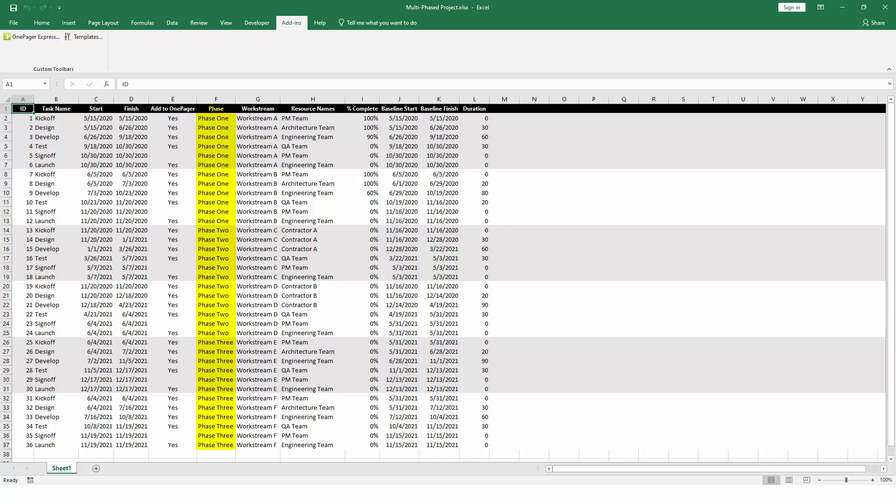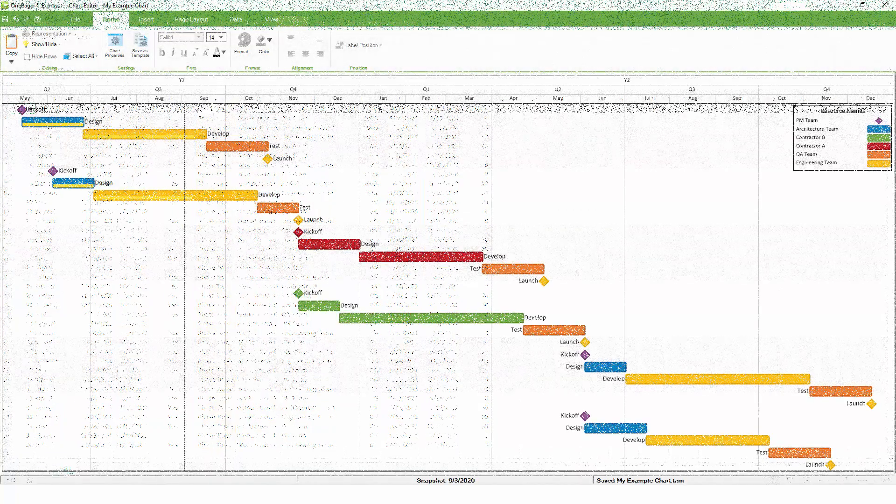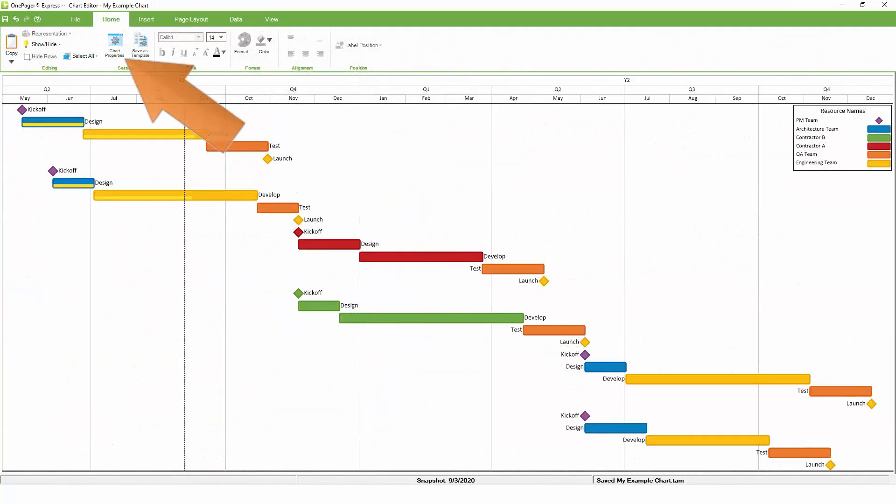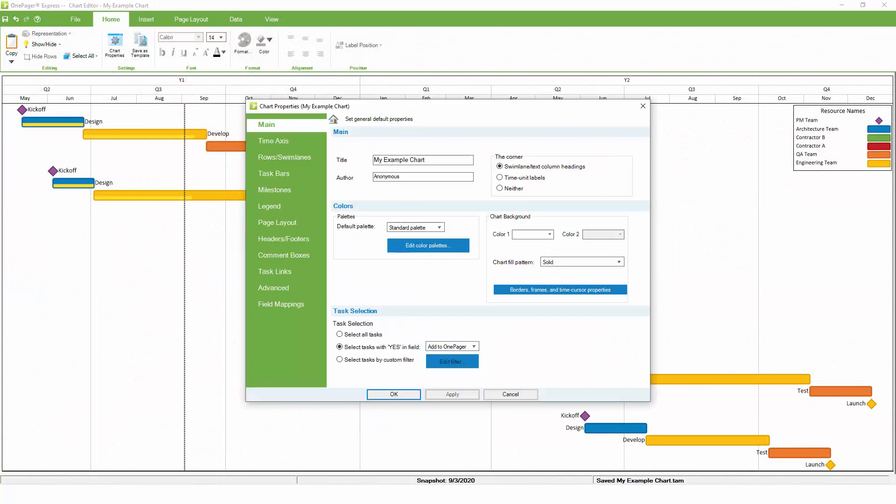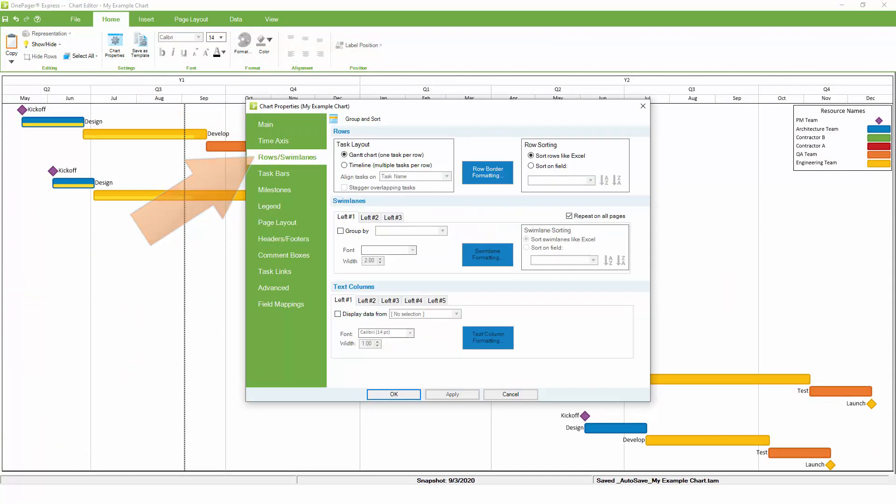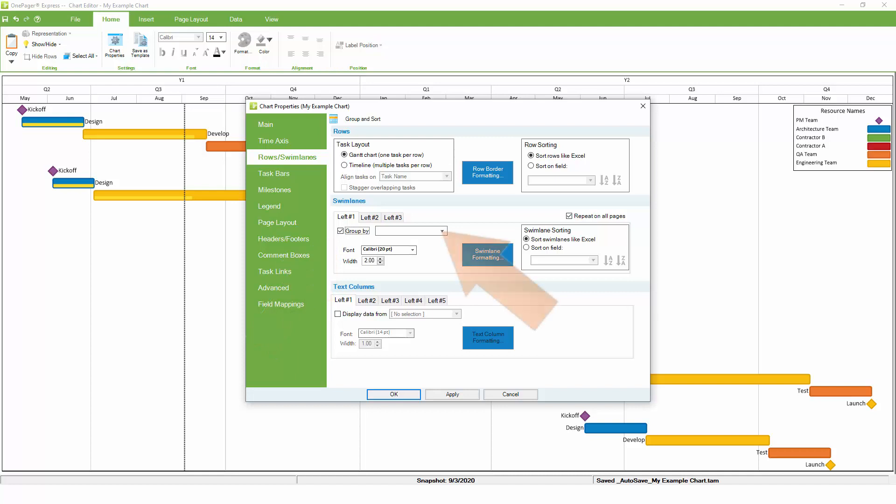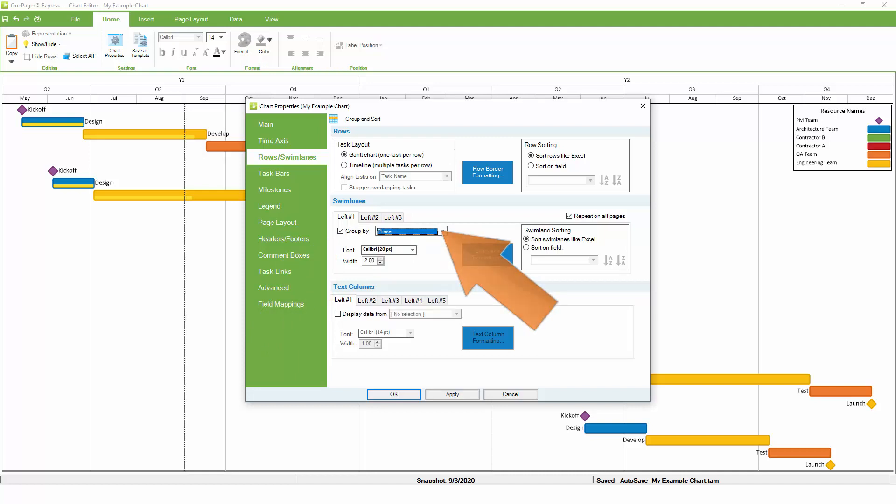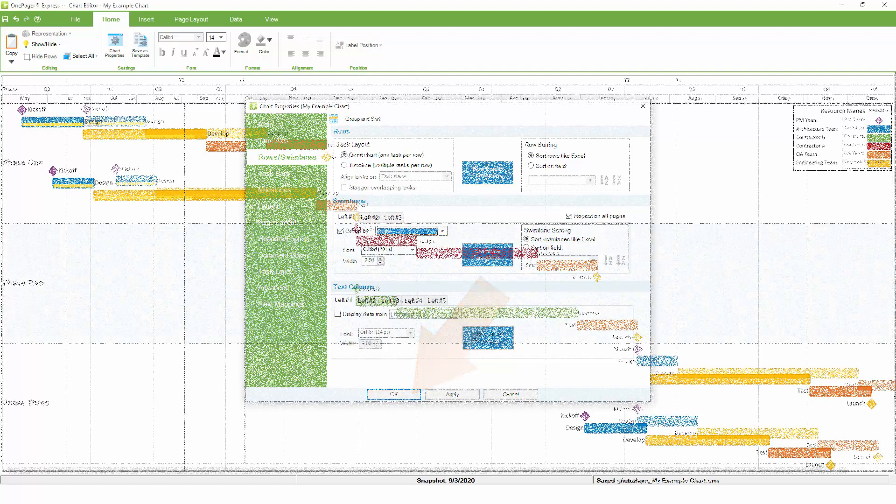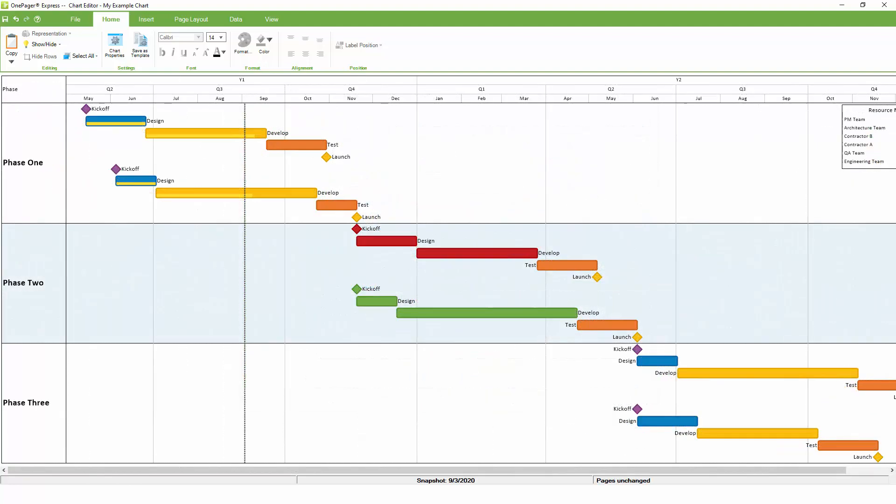To enable Swimlanes and group by phase, go to Home, Chart Properties, Rows and Swimlanes. OnePager Express supports up to three levels of nested Swimlanes, but let's start with the leftmost for now, turning it on, and choosing the Phase field out of the dropdown. When we click OK, OnePager is going to regroup and resort everything based on the phase, and the phase names will appear on the left-hand side of the chart.